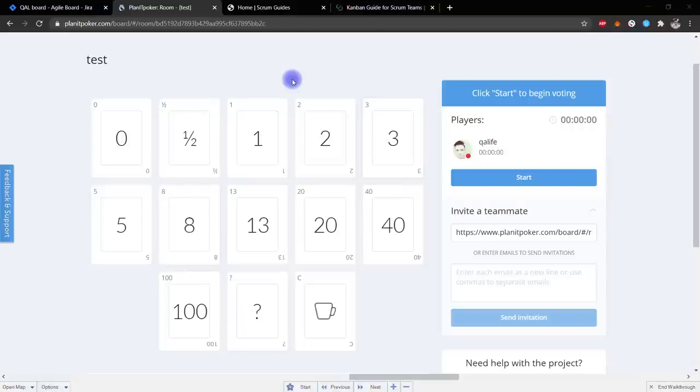So we get some user story and the whole development team gets together and they decide how many story points to assign. We have this decision if we're talking about, for example, a team that took place based on our previous experience. For example, in the last iteration, we had to develop a registration page, which we spent this certain amount of time on. And we have the second one, we have a user story which appeared in this iteration. For example, here we already have the functionality of password reset. Here we have, for example, the functionality of password update.